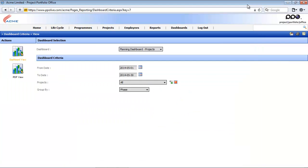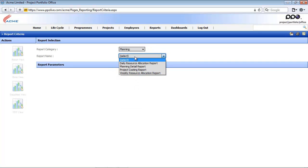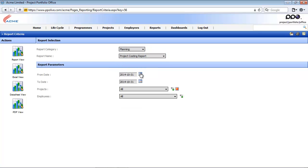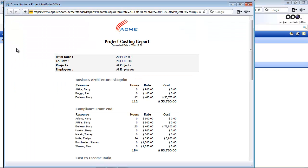I'm going to close these reports and show you the project costing reports. I'll click on the reports menu item, select the planning entity, and then select the project costing report. I'll look at it for the month of May, at all projects and all employees, and click on the report view icon. You will then see the amount of hours people are planned, the charge-out rate being used, and how much they are costing from a resource point of view. If the charge-out rates of an employee change, this project costing report will also show the updated information. To update rates, access the employee's entity, select the specific employee, and update their charge-out rates.